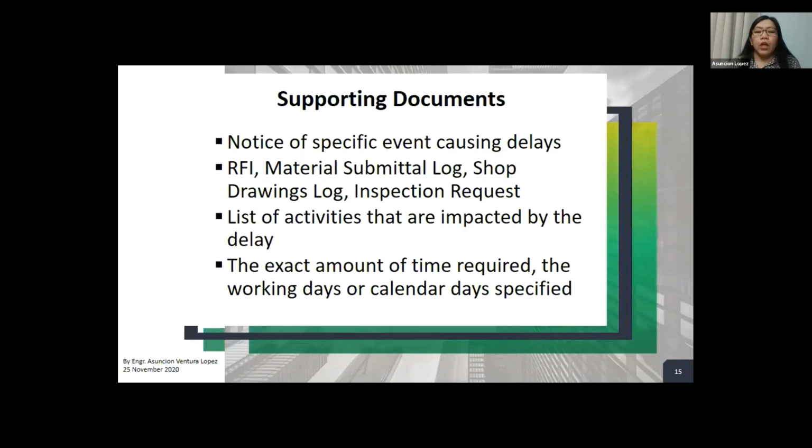Next. So what are the supporting documents that you would need? Of course, you need the notice that you have just provided. That is the first correspondence that you should see in your supporting documents. This is the notice of the specific event that is causing the delay.